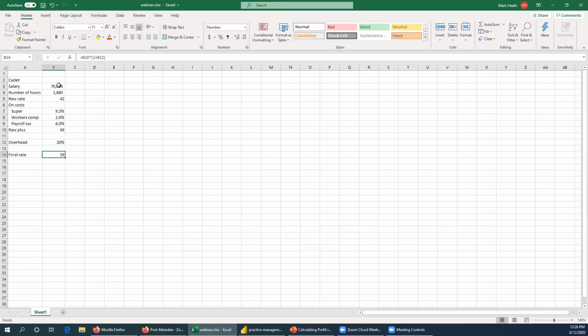Now, there's going to be obviously some issues when looking at that from a timesheet perspective, because of the 40 hours and because the overhead allocation may be out a bit. You may, workers' comp may come in higher, who knows. And so there could be some rate-related differences and some volume-related differences through the number of hours timesheeted. All of those things can be actually calculated in Power BI and presented to management as a variance on the costs from a portfolio perspective, from a corporate profitability being generated out of your accounting system versus a UniPhi profitability being generated by standard rates.